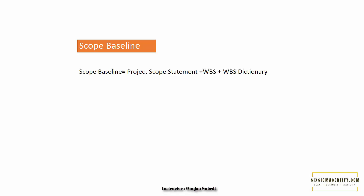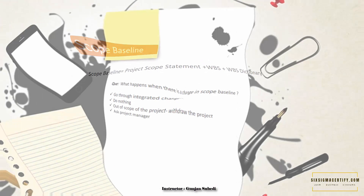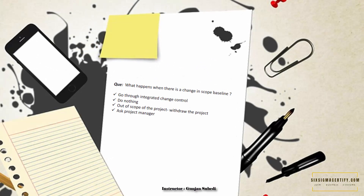For now, just understand that if the scope is changed or any new scope is introduced in the scope baseline, it has to go through and be approved by the integrated change control process. So we have a question: what happens when there is a change in a scope baseline or addition of any new scope in the project?